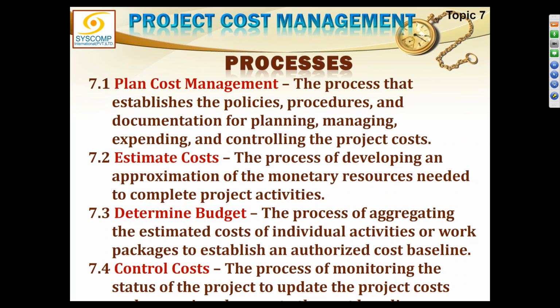Therefore, you will try to debate with the project manager why and how he has estimated this cost and how it can be reduced and all that. And ultimately, you assign him the budget. According to that, the budget has to be assigned after due diligence, after discussion and agreement of both the sides, the project manager and the project sponsor, and whomsoever is responsible for the budget. You have to negotiate between these two people what should be the price fixed for this project to be actually done. Did I answer your question?